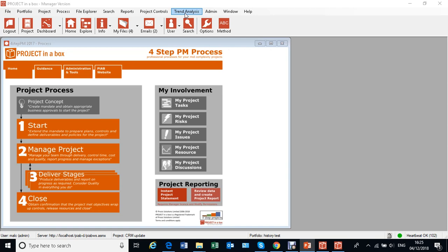We also have what we call plan properties. They're created for you automatically from the content in your project controls. You'll plan your risks and issues, things like the total number of overdue risks, the number of open tasks, the percentage completed of the project, things of that type, automatically created for you as project properties.